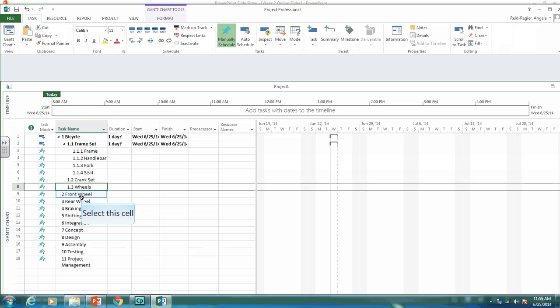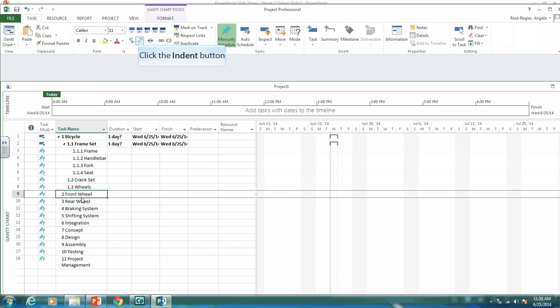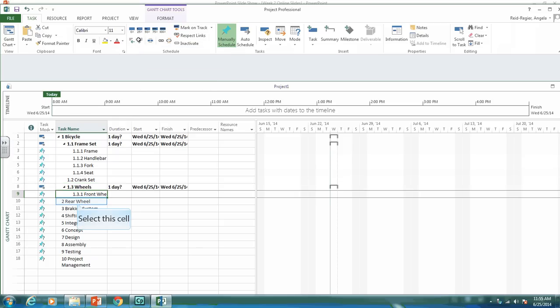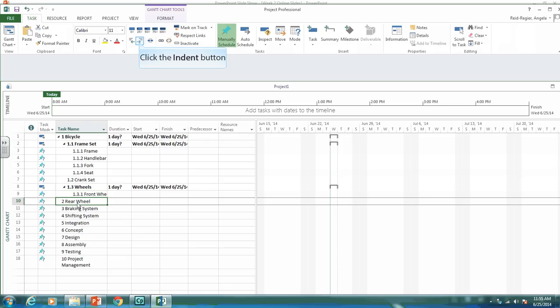The front wheel needs to come under the wheels, so I want it as 1.3.1, which means I indent it twice. Same with the rear wheel, I want it as 1.3.2, so I indent it twice.